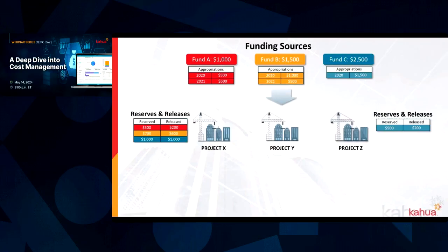When you reserve the money, it's earmarked. You still can't write budgets and commitments and spends or actuals against it until the money's actually released. So you can hold the money back and reserve it to make sure you have enough to finish the projects you need to in your capital improvement plan, but you can also make sure only the released amounts are available to people to actually do the work, so we don't over budget or over obligate or commit or spend our funding, and the system will help in the management of that.